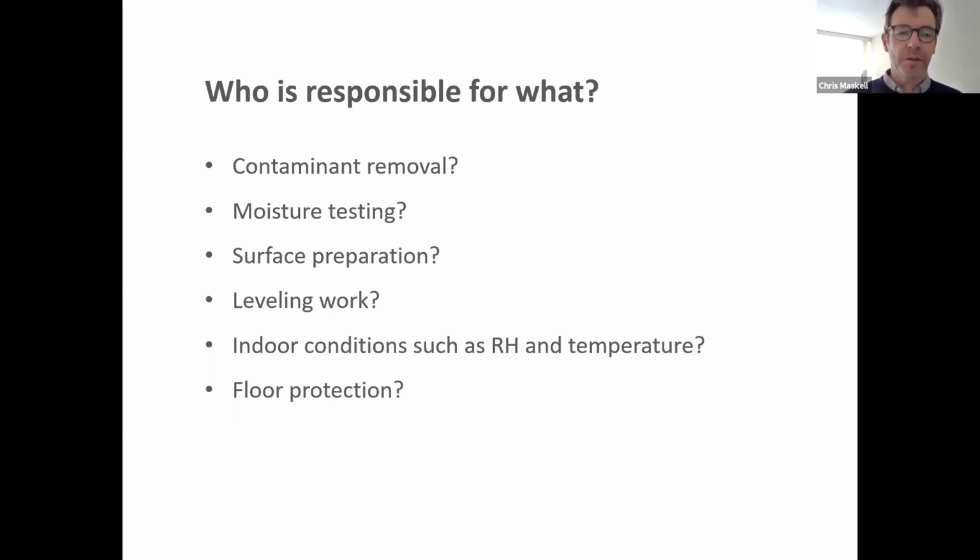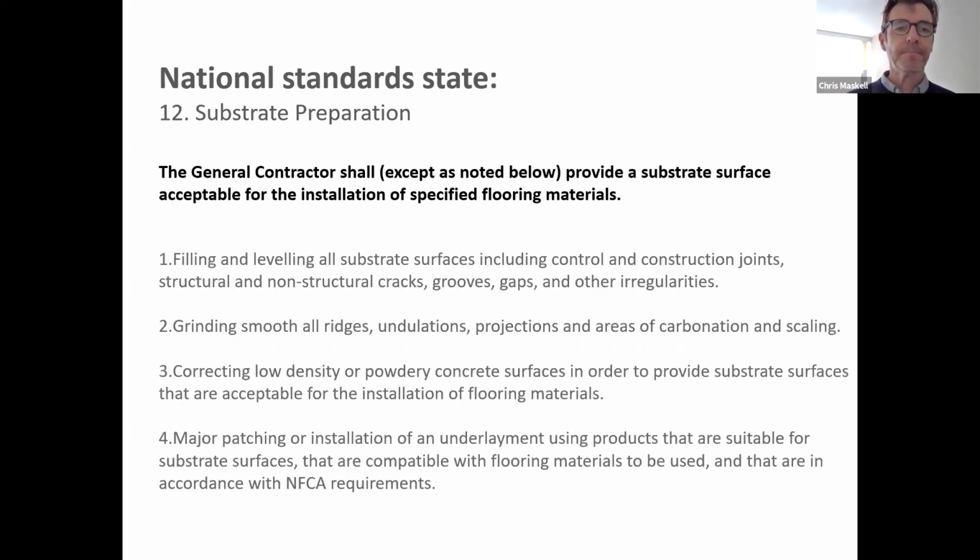And floor protection. For example, once the installer finishes installing that beautiful wood floor or that LVT floor, it is not his or her job to cover it and protect it. Once you're done, you broom sweep it, all the sawdust off, you leave, you're not coming back. So it's the general contractor's job to then cover it and maintain that covering, that protection, until substantial completion or occupancy when the owners move in.